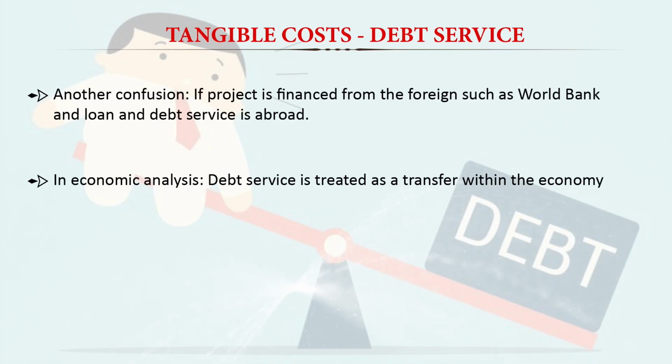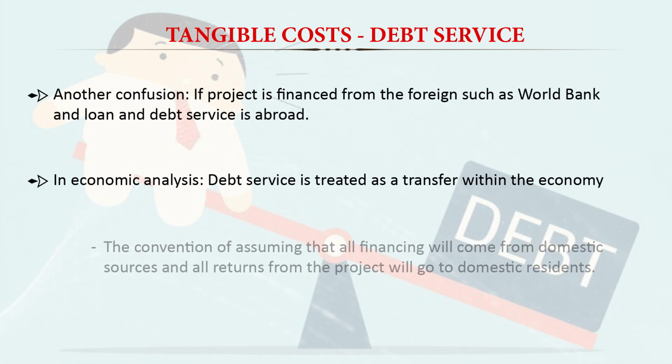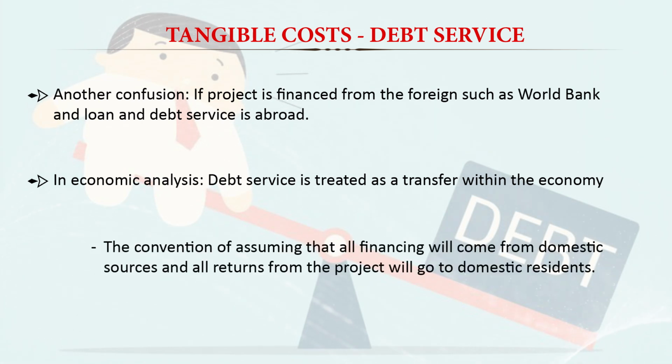So in case of economic analysis, the debt service is treated as a transfer within the country. The convention is to assume that all the financing will come from the domestic sources and all return from the project will go to the domestic residents. So this is the basic assumption that all the resources for the project come from the domestic resources, and all the return will go to the domestic residents.